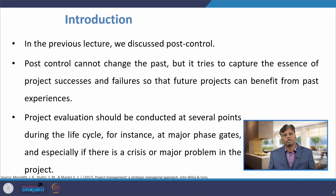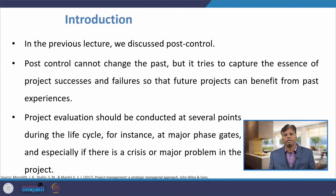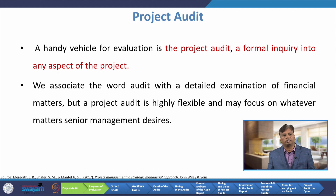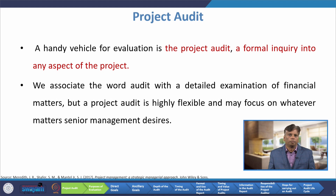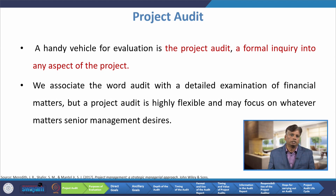In the previous lecture, we discussed post control. The post control cannot change the past, but it tries to capture the essence of project successes and failures so that future projects can benefit from past experience. The project evaluation should be conducted at several points during the life cycle — for instance, at major phase gates, and especially if there is a crisis or major problem in the project. A handy vehicle for evaluation is the project audit, that is a formal inquiry into any aspect of the project. We associate the word audit with a detailed examination of financial matters, but a project audit is highly flexible and may focus on whatever matters senior management desires.